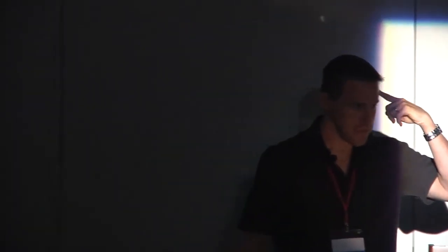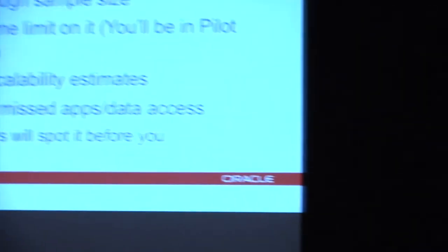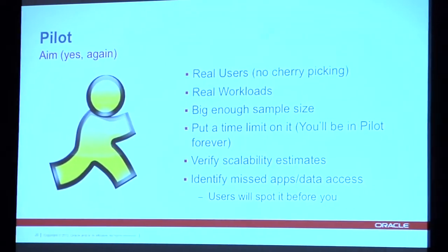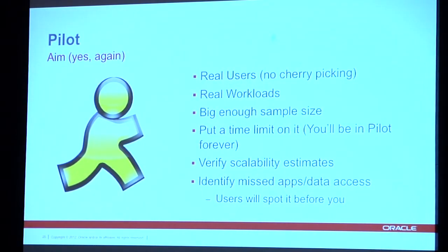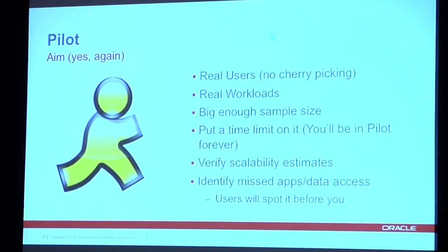But yes, we're going to aim one more time, and this aim is finally did we get it right? And this is the pilot phase, and this is also one where you want to make sure you put a time limit and set yourself a goal. And you can push the goal, but without a decision point, like we're going to run the pilot for 3 weeks, 4 weeks, 10 weeks, whatever, it'll last forever, and you will never grow, and you will never deploy this thing permanently.